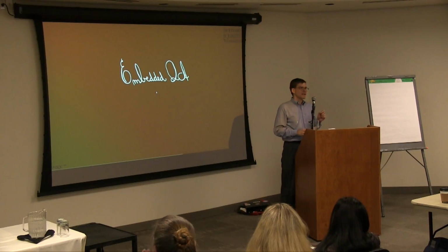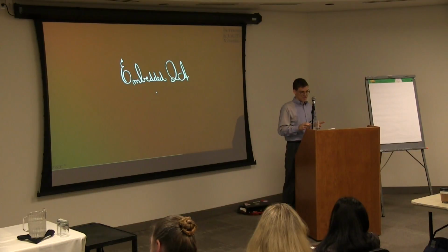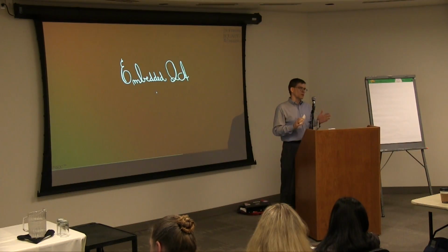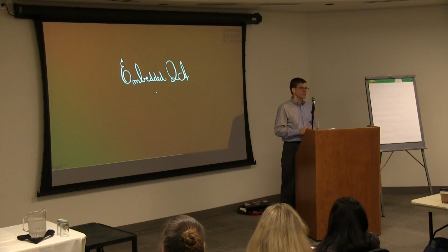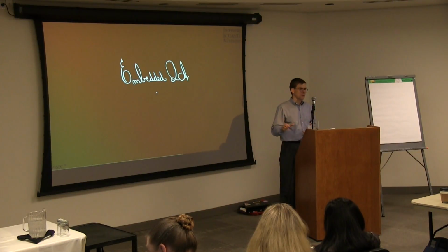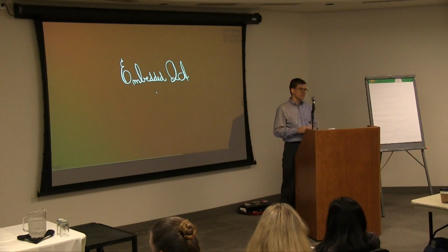So there were a couple of very negative side effects of this process. One was that, again, because the development teams did not have the cultural muscle of being able to allow QA enough time to validate, we got to the end of the sprint, they committed their code, there was certainly not enough time for QA to do that validation, and we had a large number of story points that were carrying over from sprint to sprint.